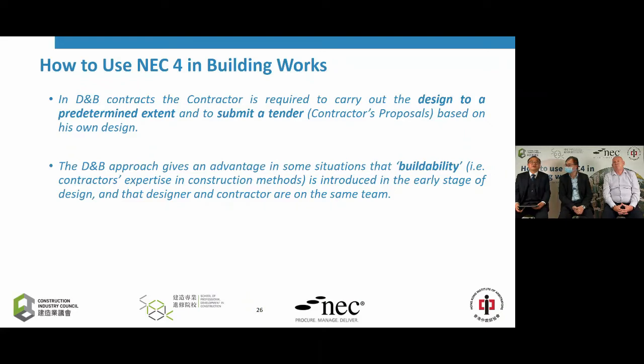So that is, the contractor's expertise in construction methods actually can be relied upon even at the stage where the design process is being developed. So it is introduced in the early stage of design, and the designer and contractor are actually on the same team. So these are the so-called conventional thinking of why it is justified to use a design and build project, okay?